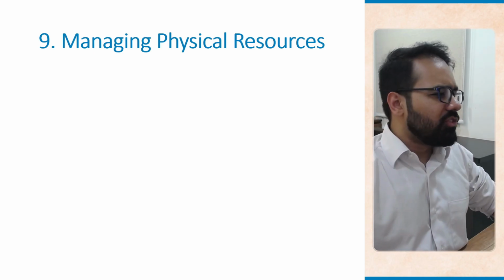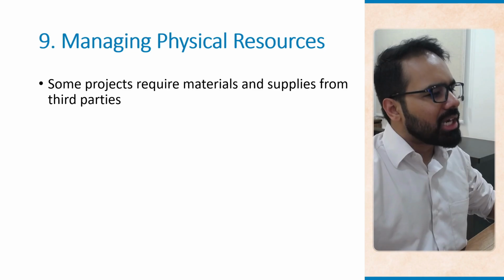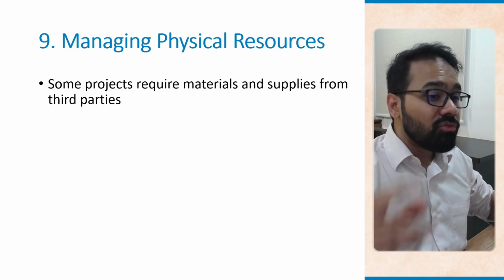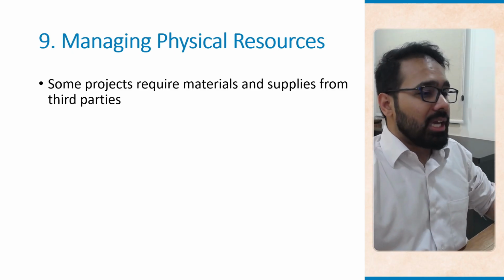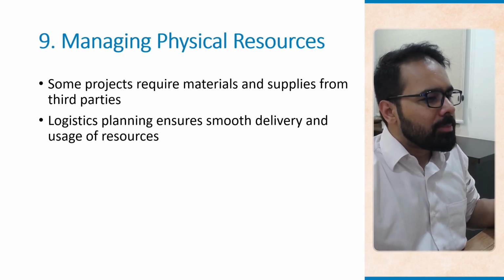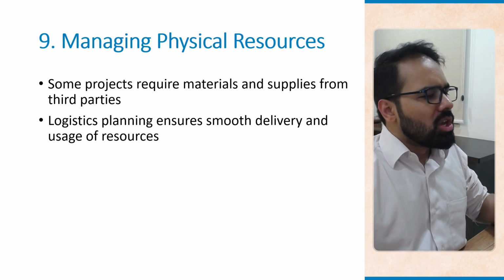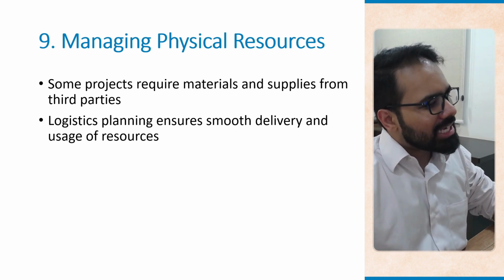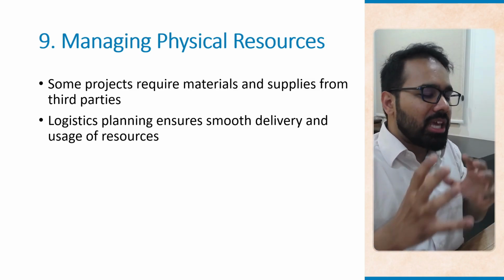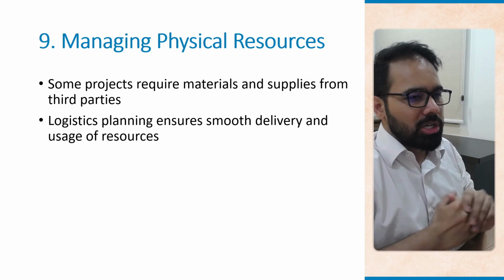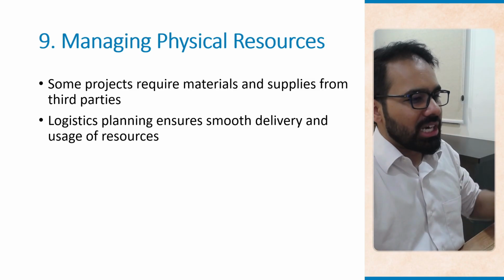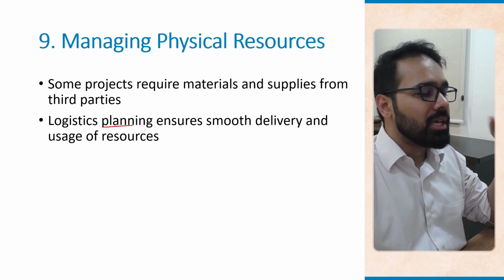All right, managing physical resources. Now, some projects require materials and supplies from third parties such as servers, hosting equipment, and even virtual resources like licenses in our e-commerce website project. Logistics planning ensures smooth delivery and usage of resources. For example, making sure the hosting environment is ready for developers to begin deployment. So whenever your developers or your release team wants to do a deployment, your hosting environment should be ready for it. So this is a sort of logistics planning here.